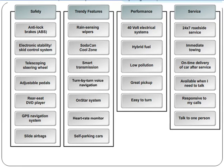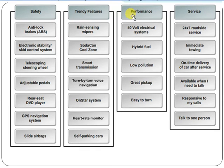A simple affinity diagram looks like this: for example, groups like Safety, Features, Performance, and Services. If you want to purchase some equipment, each group has its own points. Based on grouping, prioritization, and ranking, you should be able to analyze and take decisions accordingly. Thank you so much for your time — that's all for my side.